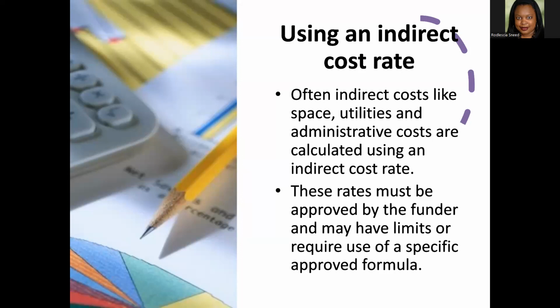That's done through our human resources department. Any contracts have to be reviewed by the county's legal department. That was a cost to the county associated with the grant that would be covered by our indirect cost rate. So the county has a federally approved indirect cost rate that you could factor into federal grants.